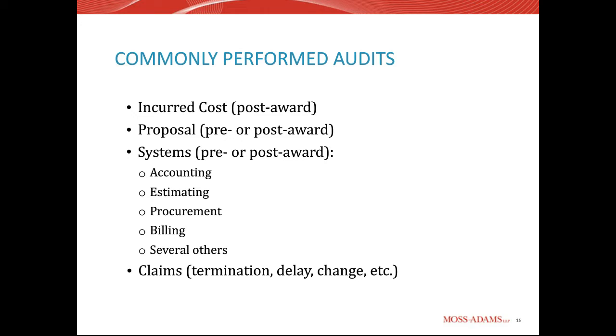To the extent that the contractor is providing false, misleading, inaccurate, or incomplete cost or pricing data when doing that negotiation, then if that comes out in a post-award audit, that's a basis for an adjustment to that contract. So those are important audits.